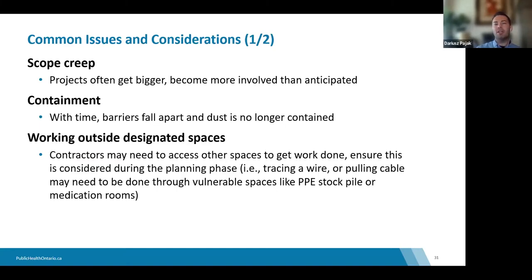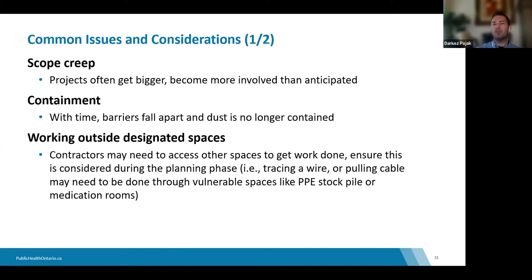Scope creep is a serious concern — projects becoming larger and ballooning beyond what was anticipated. This would not have been captured during the planning phase because the original plan was smaller. Even if the project doesn't grow outside its original footprint, contractors may need to access additional spaces to run pipes or electrical conduit to the job site, requiring hoarding and containment in other areas of the home.